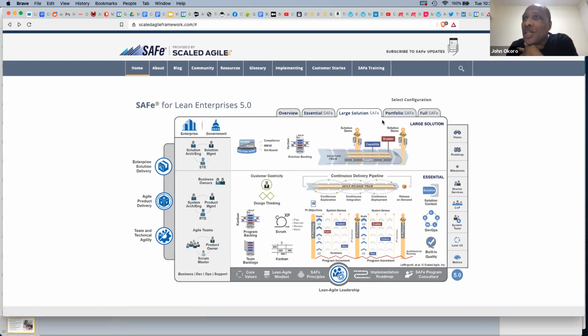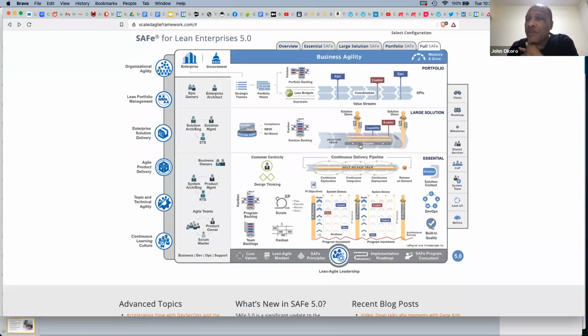So what you see is that, you see that supplier there? In fact, let's go to full. The supplier, you can think of as like a non-agile team. So you have a couple of release trains that are working along the same PI, right? And they have the same kind of schedule synchronization, but the supplier is not agile, right? So maybe they're making like airplane engines in your case, Fabrice, right? And maybe they're separate companies, Rolls Royce or something, they make the engines. So they might sync up with you and the agile teams at certain points, like at the PIs, right? Beginning and end of PI, but they are not actually running in an agile way.